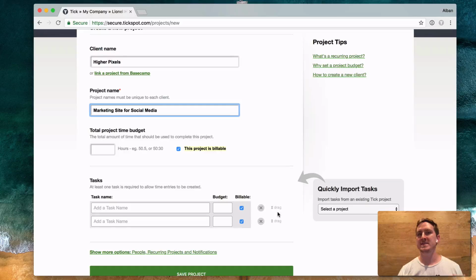This isn't intuitive to everybody, why we should have a budget. And the reason we're going to have a budget, and I'd recommend putting this on anything, is early on in the project, you want to get a good feel for where we think this project's going. This project is going to be a 100-hour project or $10,000 project. And it will help you stay on track with your project. It also will help you in the future for forecasting costs if you are going to come up with estimates for future clients, if you're doing client work, or even if it's internal.